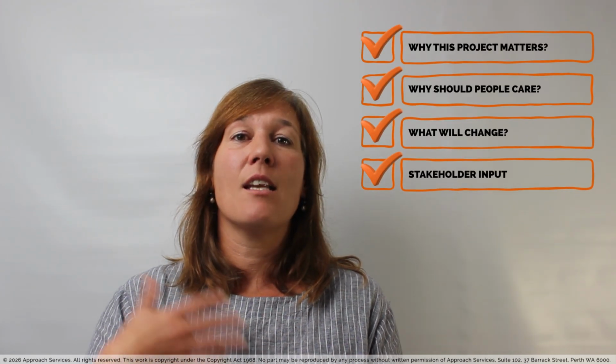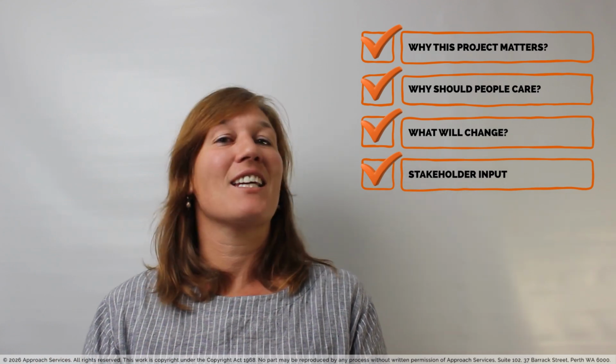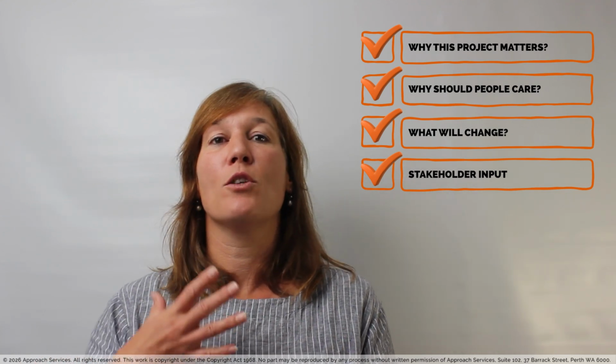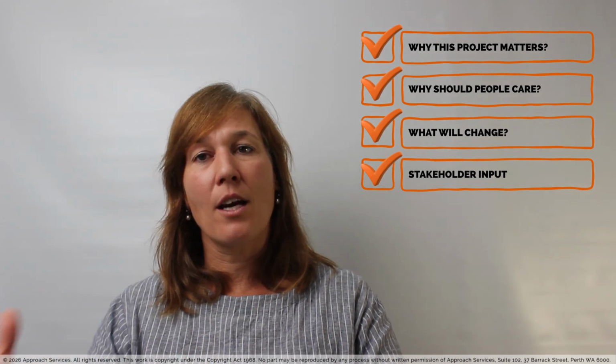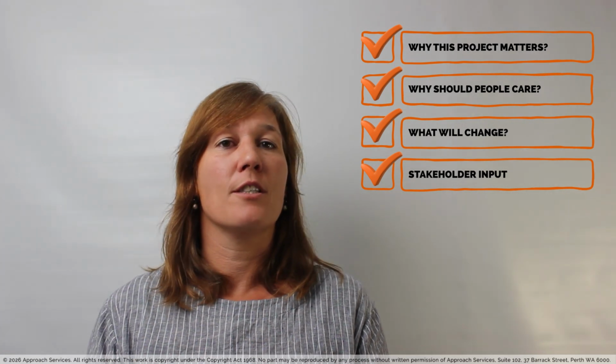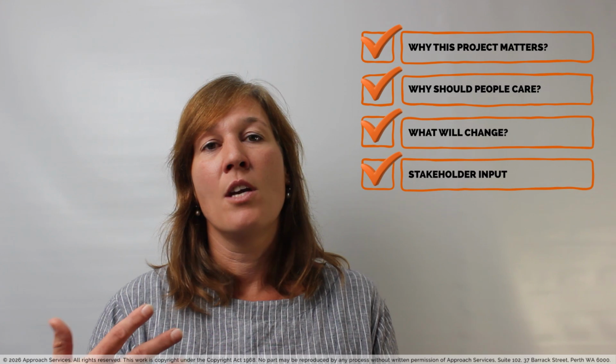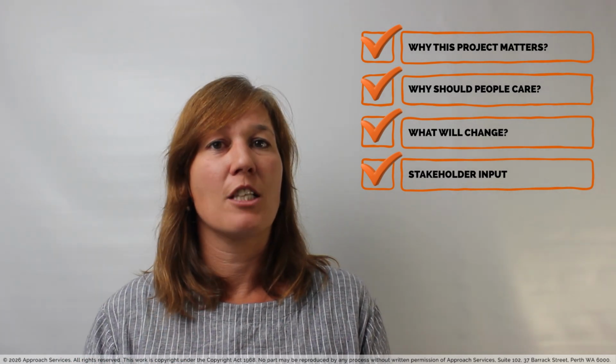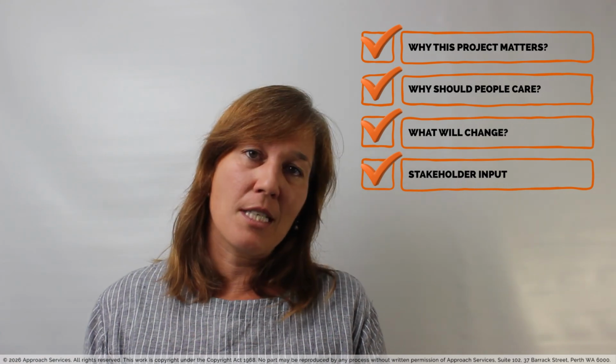Then you might invite a broader group of 10 to 20 people to a co-creation session, and with that input you go back and redraft or refine your case for change as well. So the case for change is done within the preparing for change stage, but it is a longer working process and it cannot be done by one person only because you'll only get your perspective. The broader you research the perspectives on your case for change, the more likely you're going to succeed with writing communications, engagement strategies, and change management strategies that will fit the bill for different stakeholder groups as well.